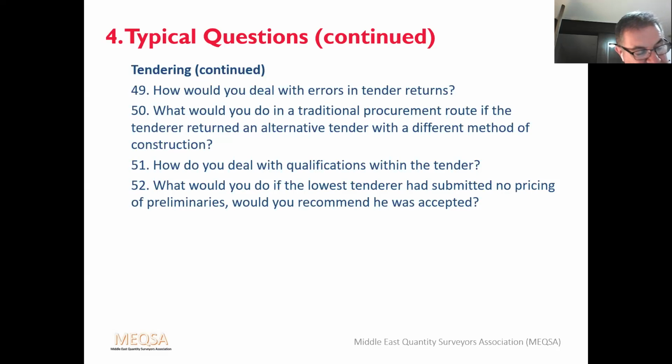But in practice, the contractor is usually provided with opportunities to provide a full breakdown within a couple of days, and this will be regarded as valid. But they're not allowed to change the figures. They're not allowed to gain an advantage. The fact that this was done should be noted in the tender report.